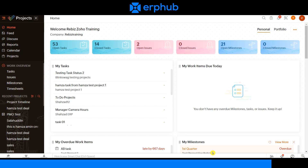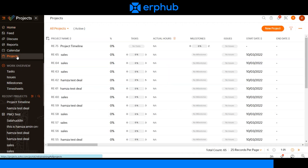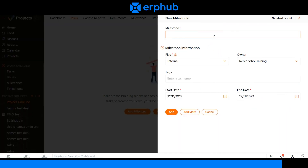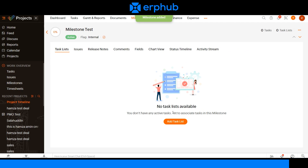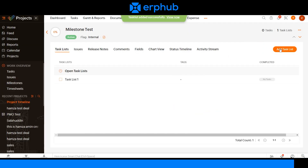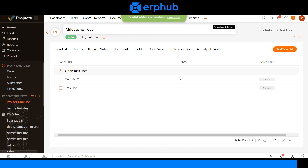To start managing and customizing your project, select the projects tab on the left navigation panel and click on the project you would like to customize. On the project screen you can access different portions of your project by navigating through the different tabs on the top of your screen. To create a milestone, click on the task tab and click on add milestone. Give your milestone a name. For the milestone information you can adjust the flag, the owner, add different tags, and adjust the start date and end date. You can then add different task lists to your milestone, and as you can see we now have two task lists associated with this one milestone.